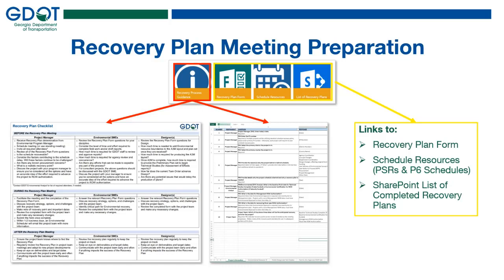In general, you want to think about the current status and forecast dates for key deliverables and milestones, think through ways you might be able to expedite items, and any potential schedule risks — for example, something specific to archaeology or history that might impact the schedule. The checklist and Excel form are the main items to assist with your preparation. If you take time to reference these items prior to the meeting, the process will be efficient and work as intended. I'll pass it off to Liza to talk about the actual digital form used at the meeting.